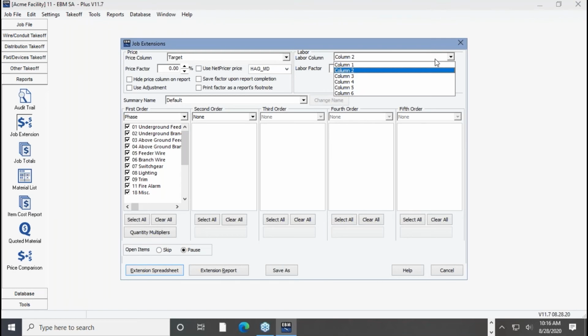I don't typically like to use that number unless I've got a job where it's A, easy, B, there's a lot of repetition, like an apartment complex or something, and C, all the other factors are good, like maybe you've got your best crew available, weather's not an issue, general contractor's good. All of the things that just don't typically happen together would be the only reason I would go down to column 1.